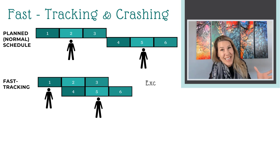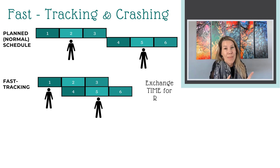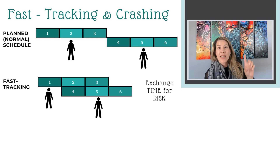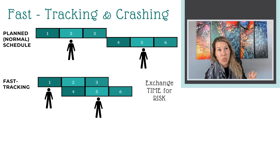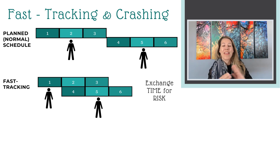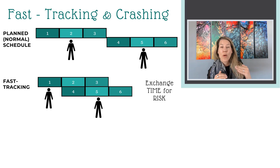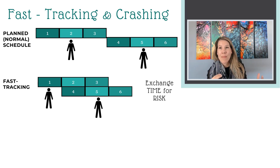Now you can see the risk here. We're exchanging time for risk, because if something changes with that user interface design, it's most likely going to change the coding as well, and there may be rework for task 4, 5, and 6. So that's fast-tracking — it's where we start to overlap work, completed in parallel with different resources, and we're exchanging time for the risk of having to complete some rework.